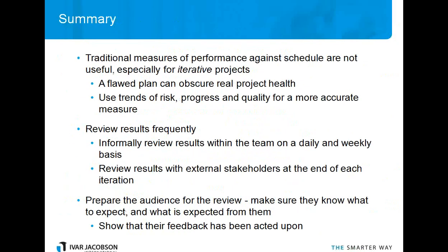So in addition, as we go through and work on reviewing the results frequently, there are daily reviews with the whole project team and an inner circle of extended stakeholders. There are weekly reviews with that same team, where there's a broader look at how the project has gone in the last week. And then there are end of iteration reviews, which might be anywhere from 2 to 6 weeks after the start of the iteration.